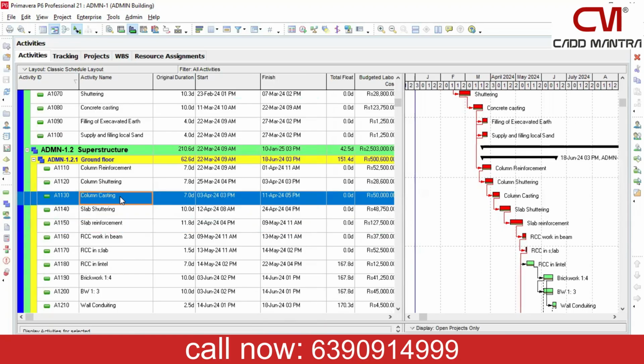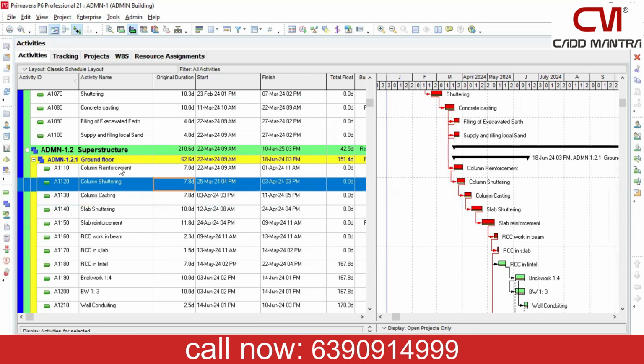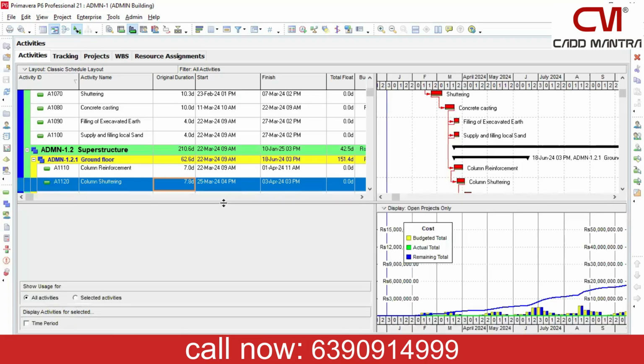So we have these activities. Now we have to estimate their duration. Duration is what we associate with each activity, how long this task will take. Then we have to define the relationship of these activities because there has to be a logical sequencing in what order we are going to do them. Considering our sequencing, which activities must follow a sequence, and which activities we can run in parallel. Based on that, we have to define the logical sequencing.